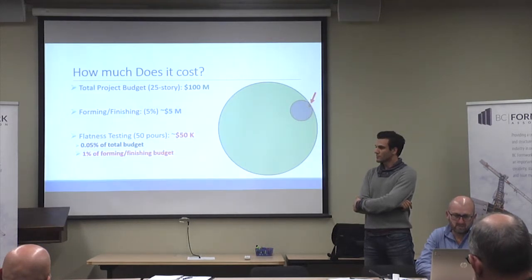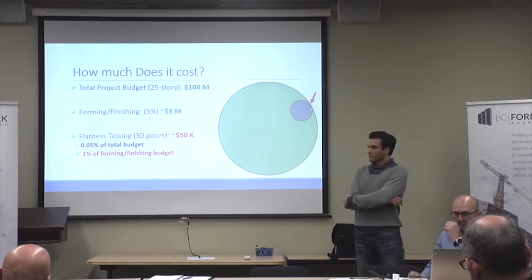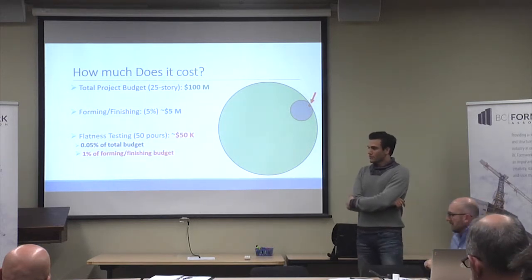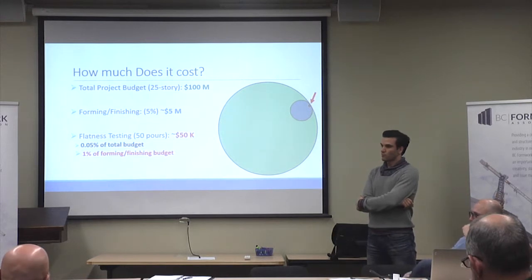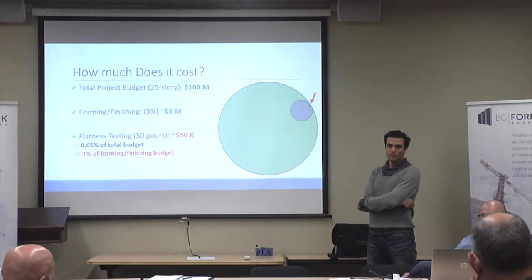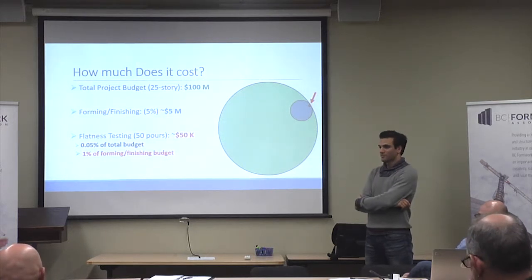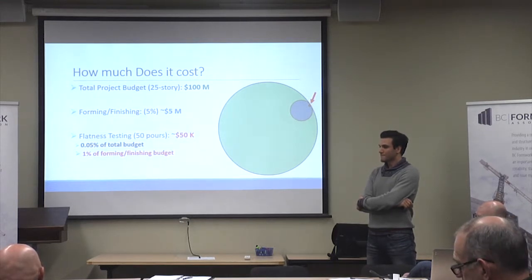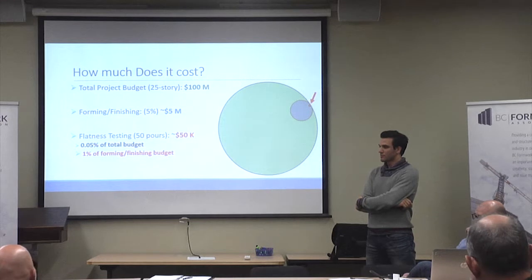We're replacing the concrete. It's their concrete, but we fight with the rebar placement. We hide all the rebar deficiencies as soon as we're done. So this is your avoid-the-back-charge card. We're trying. That's our insurance. So it is an insurance, but depending how savvy the contract writer is, you can either be hooked on it, or even with this proof that you've done, they just deny that the crack exists, or the deflection.